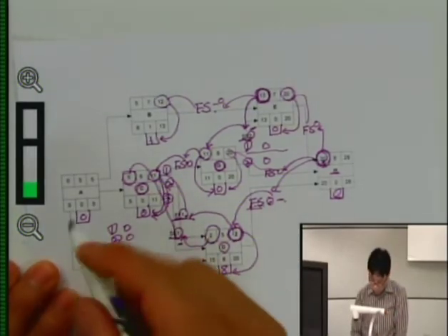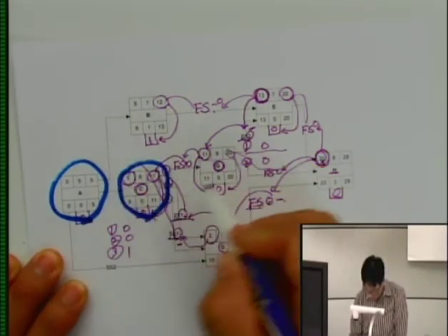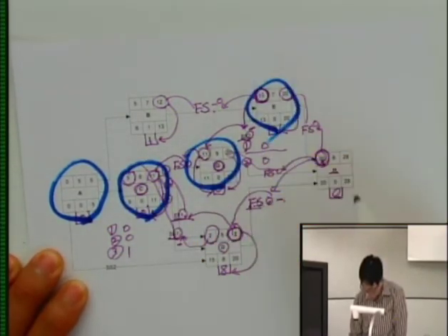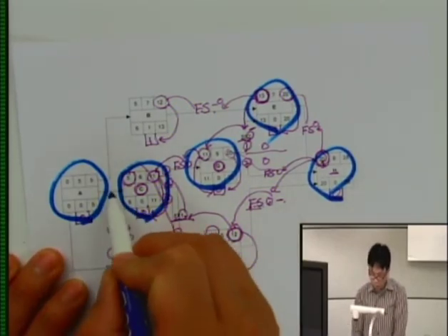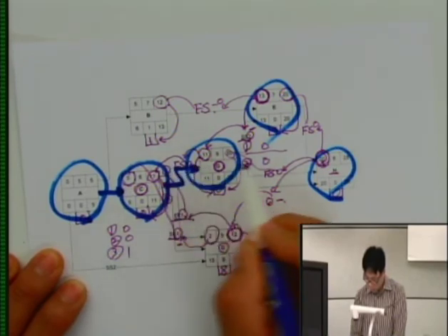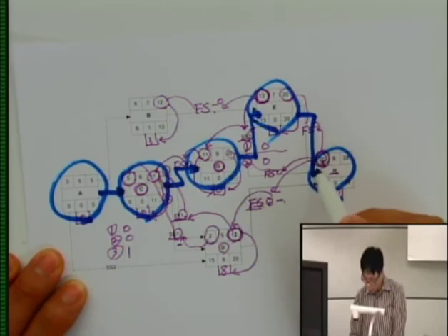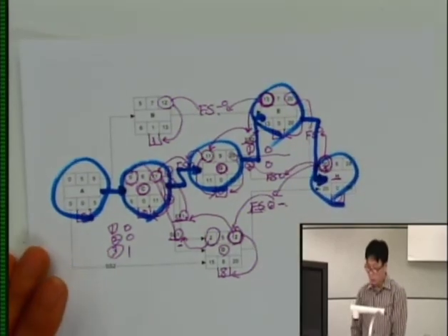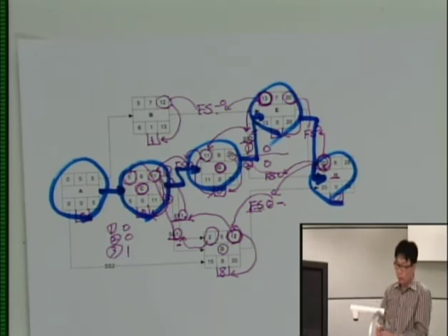So from that, overall, activities A, C, G, E, H are your critical activities. Your critical path will be A to C, C to G, G to E, E to H. That's the way you can calculate a precedence network diagram.